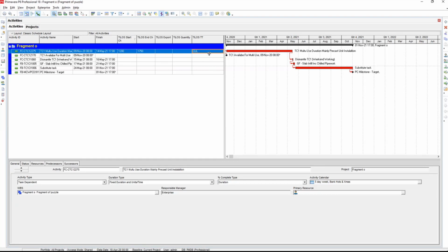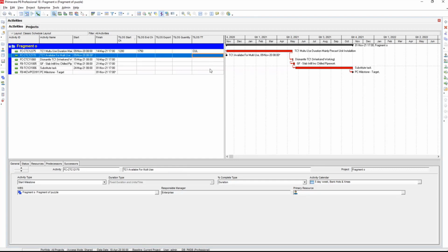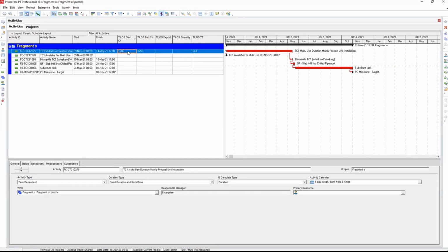So you're going to have to do that in P6 by making all the activities have a task template reference and a start and end chainage. That's the minimum. Everything else is going to come out of P6. So generally speaking, in a large P6 program, you don't want everything there. So you can have another user-defined field where you say anything with a Y in it will be imported.